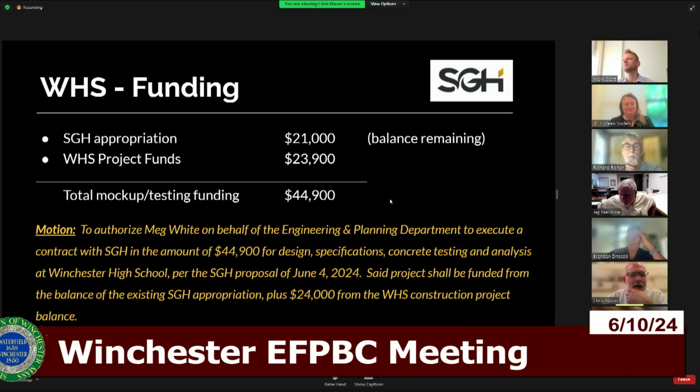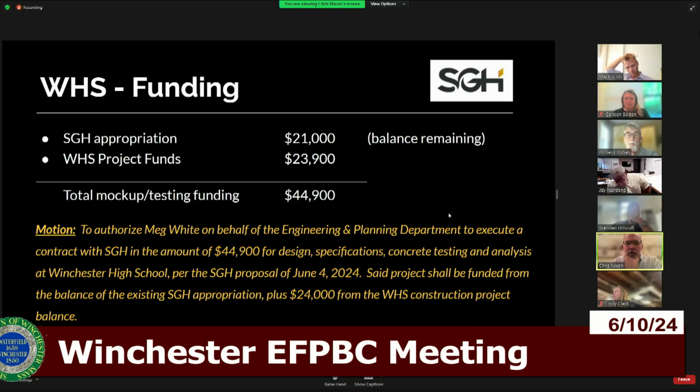Okay. I move to authorize Meg White on behalf of the Engineering and Planning Department to execute a contract with SGH in the amount of $44,900. Actually, excuse me, I'm going to round that up. In the amount of $45,000 for design, specifications, concrete testing, and analysis at Winchester High School per the SGH proposal of June 4th. Said project shall be funded from the balance of SGH appropriation plus $24,000 from the Winchester High School construction project balance.